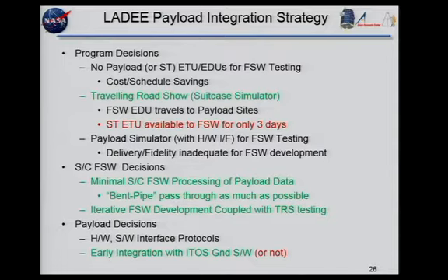Early integration with the ground software was done on most of the payloads. On some of them, there just weren't the resources to get them up to speed and have people to connect the ground system to them. So that was done rather late in the game, which caused some consternation when we're at INT and we'd never really used the ground system to talk to the payload.